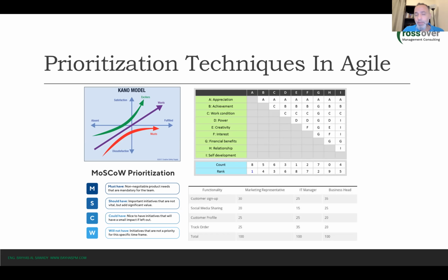So who's going to be responsible for managing the requirements and how are we going to gather or collect the requirements and who will track them and who will document them and report them and so on. And we actually explained that there are so many tools that you can use in order to elicit the stakeholders' requirements. I think we explained like 10 or 12 tools for that. But at the end of the day, and this is what we would indicate in the requirements management plan, you need to select the proper tools that you can use in your project in order to collect and document those requirements. So basically, we collected those requirements, we documented them, and we used also another tool to trace and track them, which is the requirements traceability matrix.